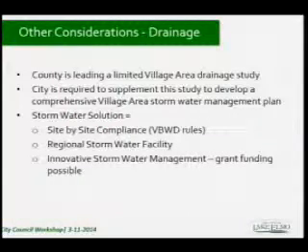So the stormwater solution that'll be part of that project will have to be bigger than just that corridor and bigger than that project. Right now, that study is investigating the current problems and getting to understand the issues. Then we'll be trying to define first a bigger picture solution, and then what the first specific project will look like that'll start to build toward that. At that point, the county will probably step aside, and that's where, getting back to Nick's point that he started this meeting with, this needs to be something that the city then supplements.